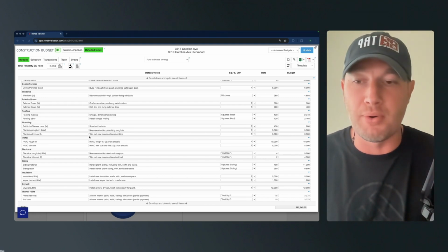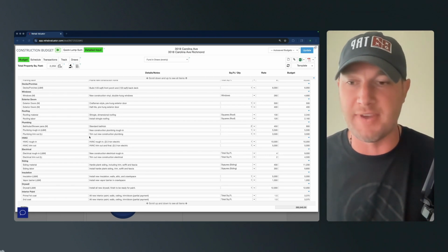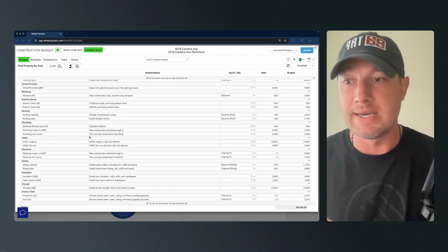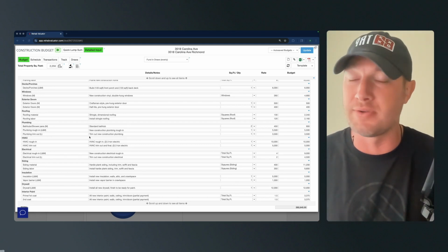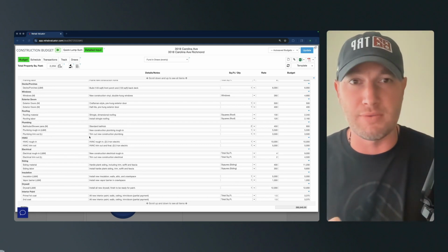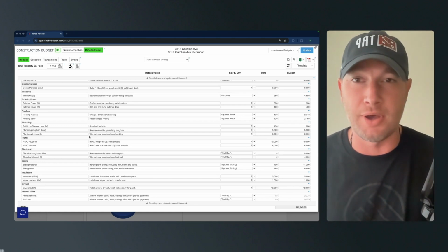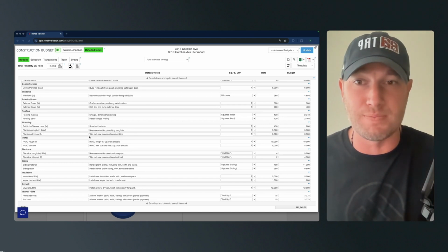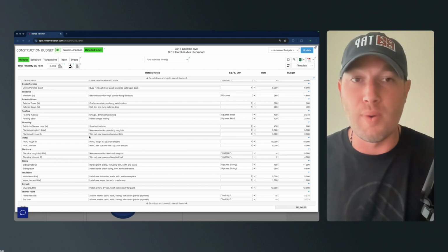I always think 1 point is a supply line and a drain line. So that's all your toilets, vanity faucets, kitchen sink faucets, shower faucets, etc. And then all your simple supply lines. So your refrigerator, your spigots, pot fillers, those would all be like half a point. And then they add up all the points and they charge you a price per point. And these prices per point are also wildly different.